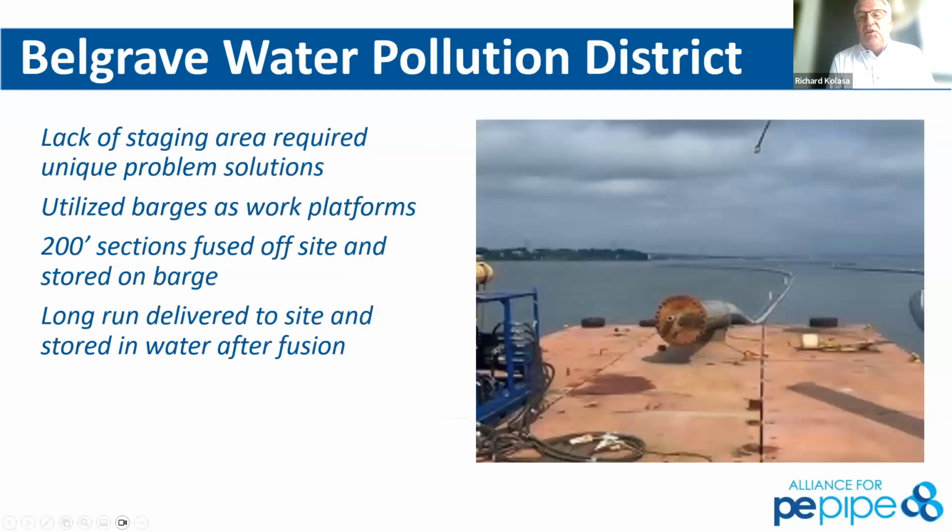And what we had to do is, because in New York we had limited space to produce this long length to drill in, they actually did it all on barges. And there were a lot of challenges there, not only securing the fusion equipment or the T900 onto the barge to make sure it didn't get pulled off if resistance or winds came up with that string hanging out the back, but it worked out very, very well.